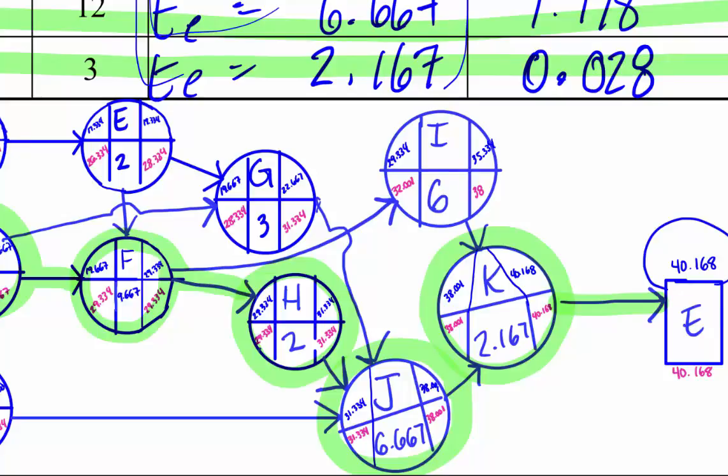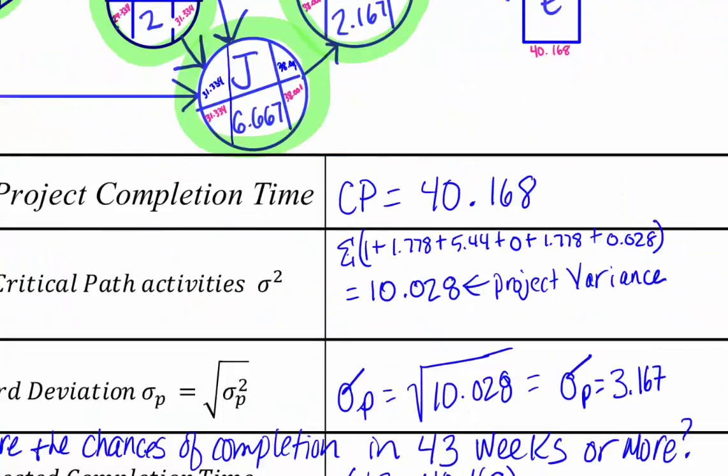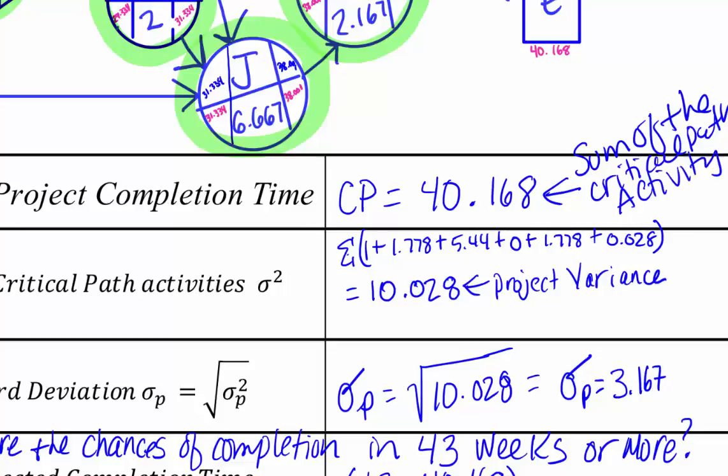So we go down here and the project completion time is going to be noted there. So this is going to be computed as the sum of the critical path activity times. Then we go here to this next box, and we're going to compute the sum of the variances of each of the activities on the critical path.